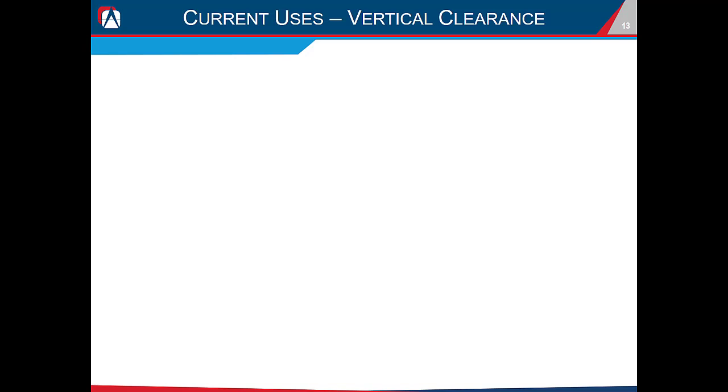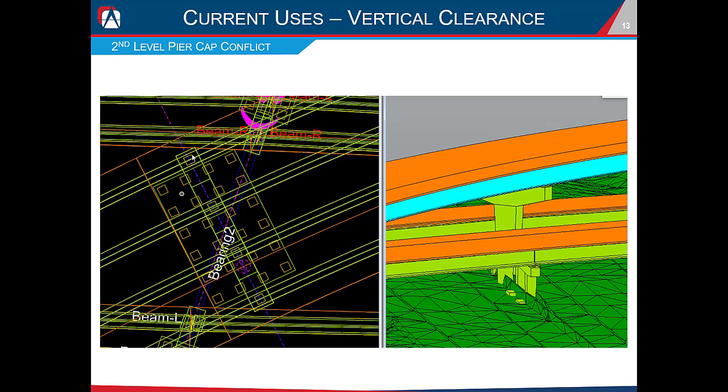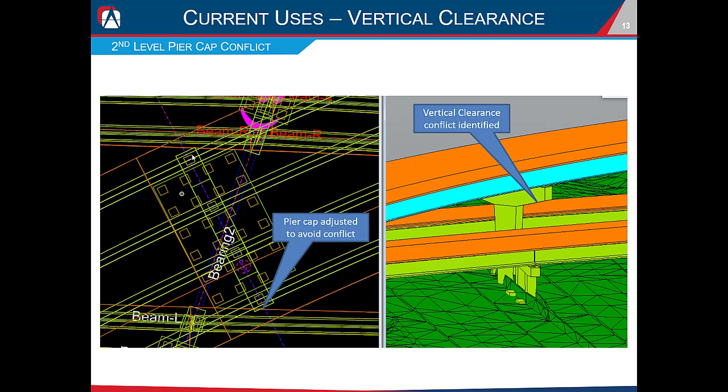OBM is also useful for checking vertical clearance against other structures. The roadway group typically looks only at the superstructure depth, but by modeling the bridge in OBM we identified a vertical clearance issue between the pier cap of a second-level bridge and the first-level bridge deck below. We were able to adjust the pier cap lengths accordingly and eliminate the conflict early in the design process.